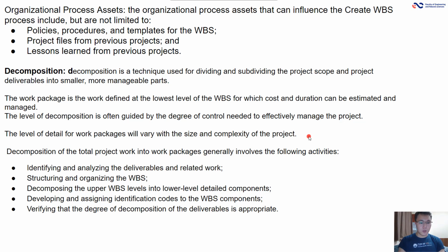Decomposition of the total project work into work packages generally involves the following activities: identifying and analyzing the deliverables and the related work, structuring and organizing the WBS, decomposing the upper WBS levels into lower level detailed components, developing and assigning identification codes to the WBS components, verifying that the degree of decomposition of the deliverables is appropriate.